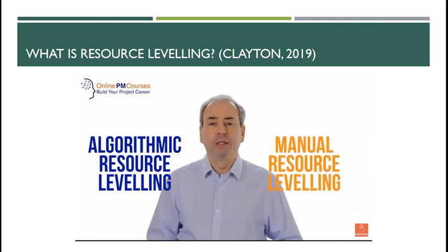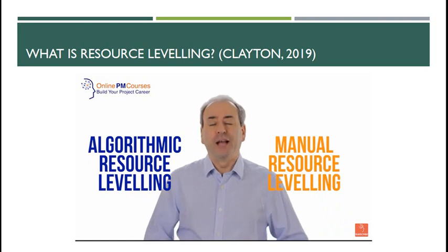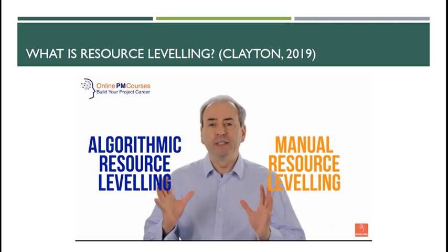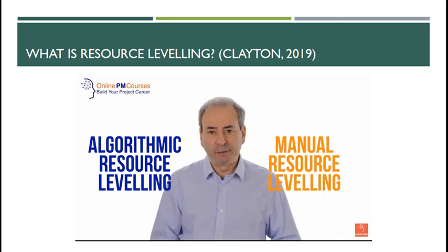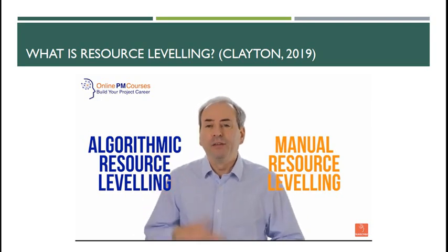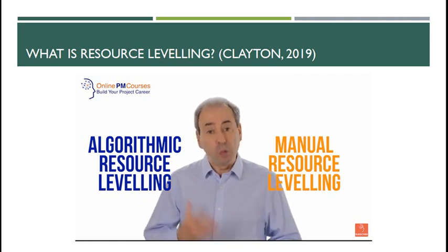So when would you use automated algorithmic resource leveling on the one hand, and when would you do it manually on the other? For algorithmic resource leveling, you need to start with a clearly defined set of skills that you can allocate to team members. Each team member can have multiple skills, but you do need a limited defined set of those skills that you can allocate. And you also need to be able to define very clearly what skills are needed for each task. If you can't do that, then you can't specify the work that the algorithms need to do.